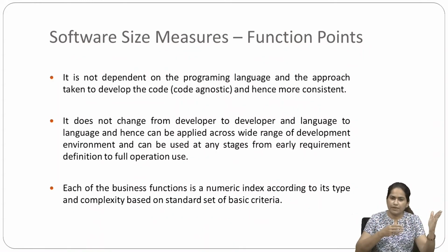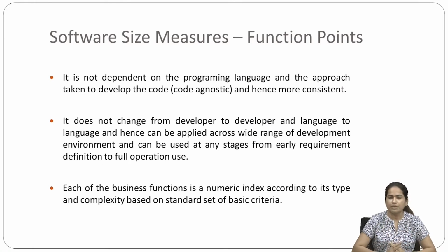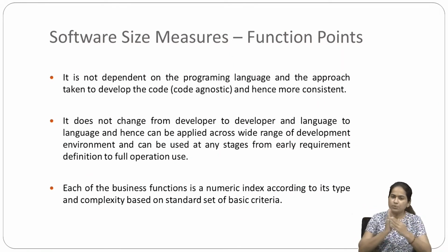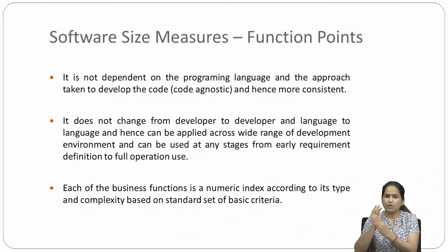LOC is language dependent, which is a limitation of it. While when we are talking about FP, it is not language dependent. It is not dependent on programming language, and because of that, it is more consistent. It does not change from developer to developer and language to language, and because of that, it can be applied across a wide range of development environments and can be used at any stage from early requirement definition to full operational use. From starting to end, at any point of time you can use FP.